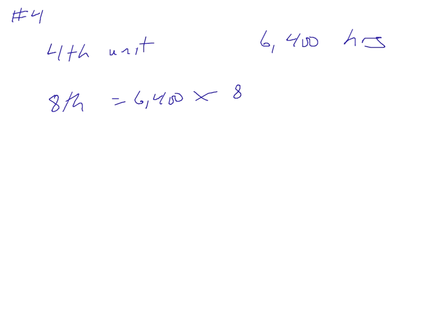So since the 4th unit is 6,400 hours, and we already know we're using 80%, the 8th unit is just 6,400 times 80%, and that gives us 5,120 hours.